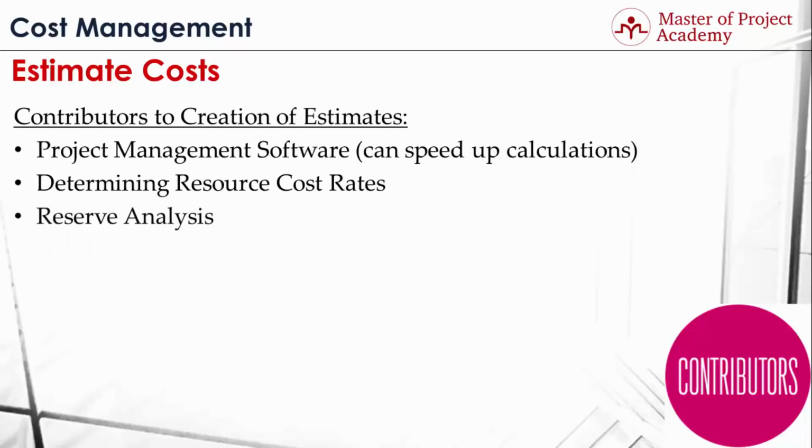Reserve analysis is another contributor to the estimation process. Reserves are planned to accommodate unanticipated costs and risks in a project. If there are risks for an activity in the project, depending on the probability and impact of the project, reserves must be planned accordingly. For instance, if there is a risk of 2 days delay for a certain project activity in the project, additional costs that will be caused by this delay must be planned as reserve and included in the cost estimation, respectively. And the last important contributor to the estimation process is